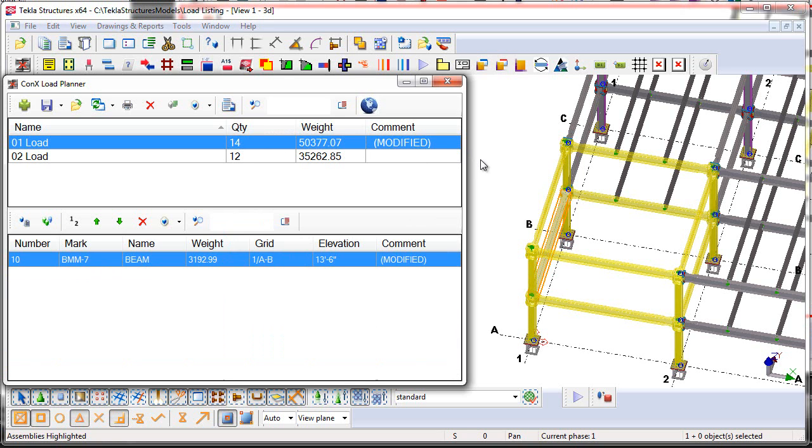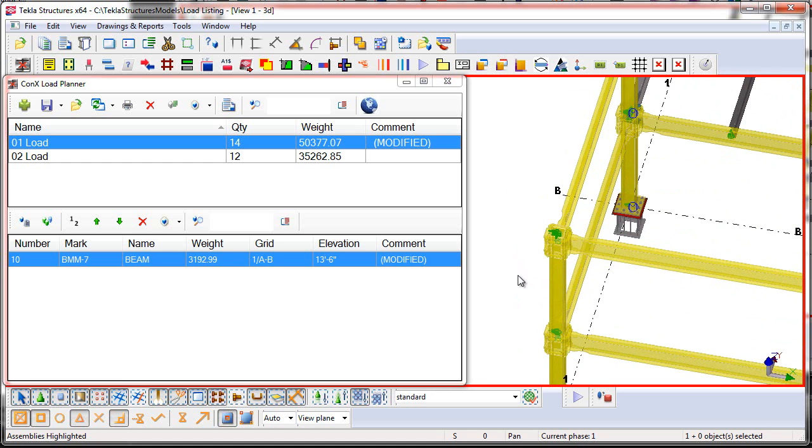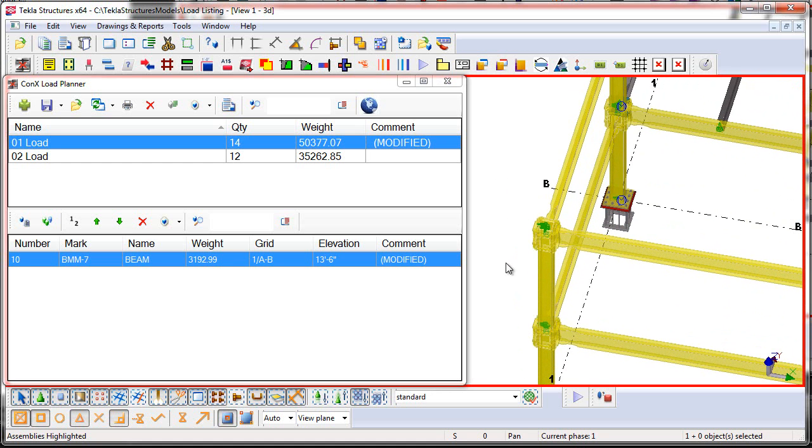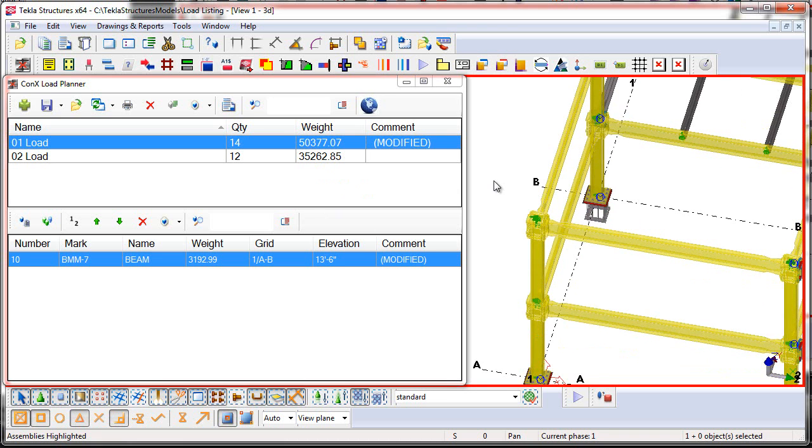Now one thing that's really nice here about the change management is it's not just good for piece mark changes or for weight changes, but it's also a nice clue into the project manager or erector to come in here and review something that he already previously thought was okay and verified could be erected and didn't have any issues. Now that there have been design or detailing changes, he's clued in to come in here and not only see how it impacts his load lists, but see how it might impact the erectability of the structure.